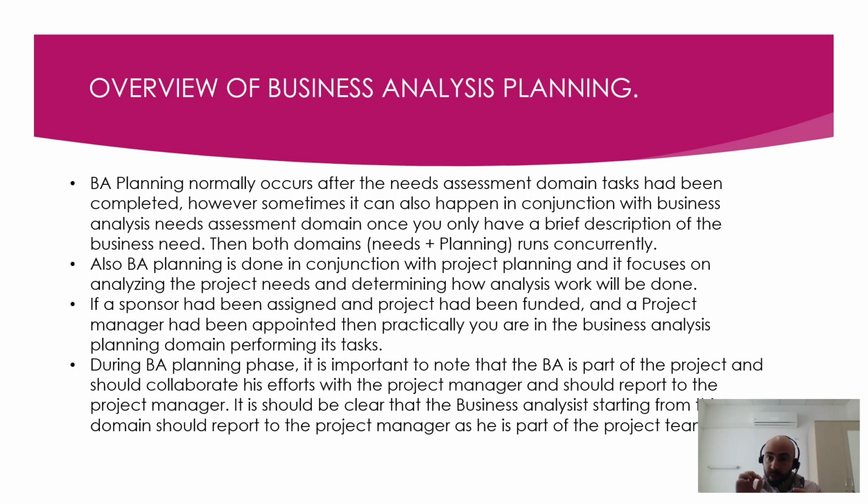I want to highlight a key point here. The business analyst's core responsibility and accountability is to do all the necessary work beforehand, which will determine whether it's a go or no go decision for the project. If it is a go decision, upon needs assessment, there will be a business case to kickstart that project. The business analyst is also involved in the project.